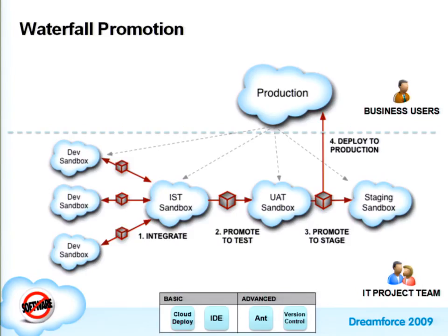And many companies actually do have a release train concept where they have periods of the quarter where they are able to release into production. So you'll find that some companies are doing releases to production once a quarter, and so you'll do the refresh as you're ready to do the staging test just before that release to production.